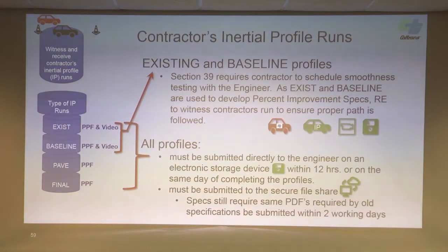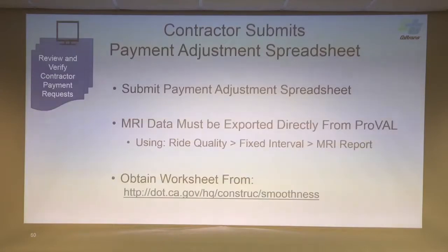And all these profiles have to be submitted directly to the engineer within 12 hours. We're going to check. We're going to use these later in the payment process.